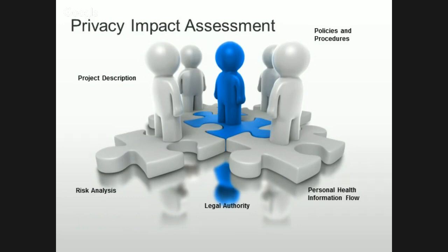You want to start it when you have signed contracts, or are really close to signing contracts, with new technology vendors if it's a technology project, or before you sign contracts with stakeholders for outsourcing services between the healthcare hospital and a surgical unit or a specialty consultation service that you're going to be sharing patients with. It takes that amount of time to help you get the information that you need from all of those stakeholders and to fold it into the mix.